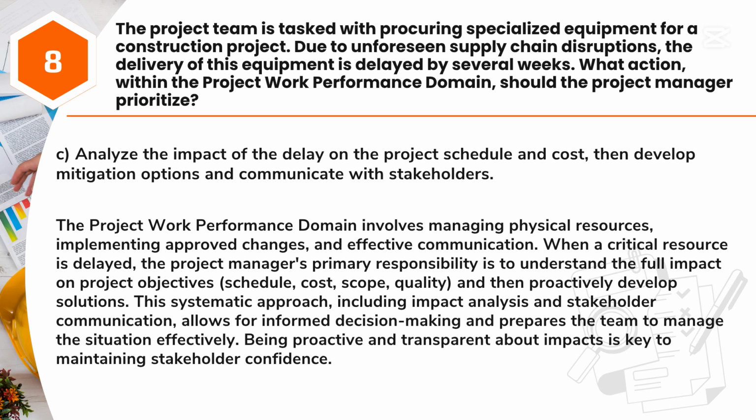When a critical resource is delayed, the project manager's primary responsibility is to understand the full impact on project objectives, schedule, cost, scope, quality, and then proactively develop solutions. This systematic approach, including impact analysis and stakeholder communication, allows for informed decision-making and prepares the team to manage the situation effectively. Being proactive and transparent about impacts is key to maintaining stakeholder confidence.